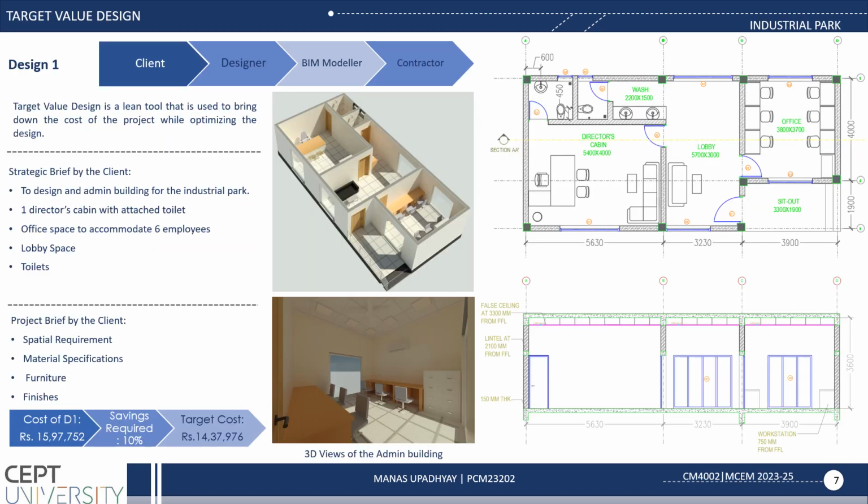Now coming to target value design. Target value design is a lean tool for design management which uses target costing to apply to project deliverables. The goal is to improve the design dependability and find a long-lasting solution. In the process of target value design, the client gives the project brief, then the designer receives the brief from the client and is required to create 2D drawings while also preparing the brief. After receiving the design, the BIM modeler gives the 3D design, then the contractor determines the rates.